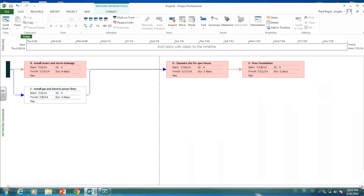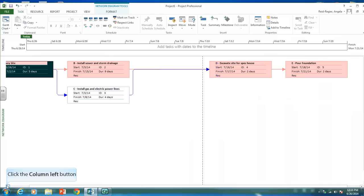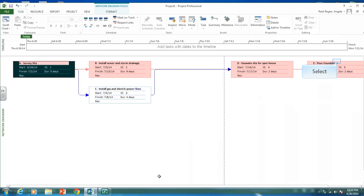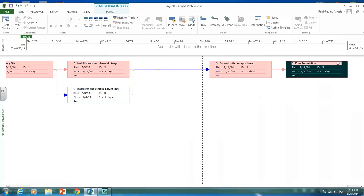One of the things it's asking is: what is the critical path for the network diagram? In Microsoft Project, the critical path is highlighted in red. So the activities that are red are the critical path — A, B, D, and E are critical. C is not on the critical path, which means it has float. These are our nodes in Microsoft Project, and it gives us our start and finish days and our durations. We know it's the critical path because the nodes are in red.